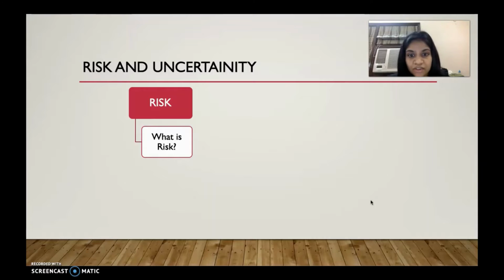The objective of a negative risk response strategy is to minimize the impact or probability of loss, while the objective of a positive risk response strategy is to maximize the chance or impact. Now, there are also two types of risks. These risks are known and unknown risks. Known risks are identified during the risk processes, and unknown risks are those that we can't identify. Now, a contingency plan is made for known risks, and you will use the contingency reserve to manage them. On the other hand, unknown risks are managed through a workaround using the management reserve.